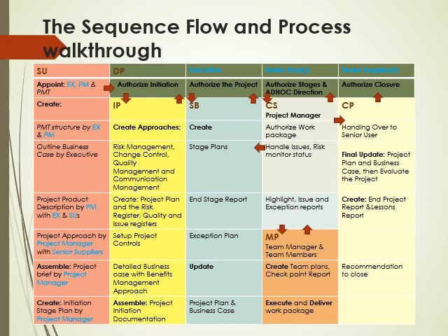Controlling the stage is where the project manager is carrying out his own activities, while managing product delivery is where the team managers and team members are carrying out their own activities. So the project manager gives the team managers their work package. The team managers will create a plan in managing product delivery and agree to the work package given by the project manager.